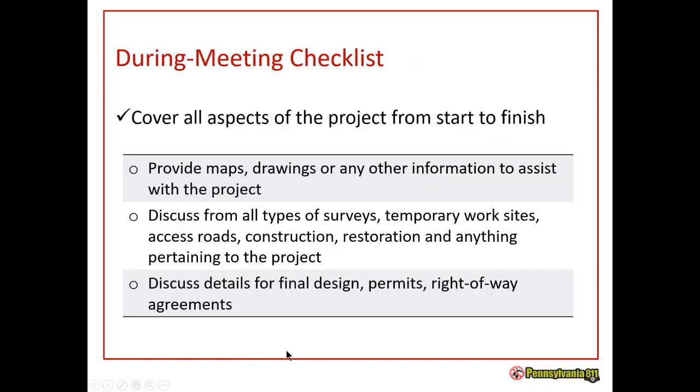So during the meeting, cover all aspects of the project, start to finish, provide maps, drawings, or other information to assist with the project, discuss all types of surveys and permitting, temporary work sites, access roads, construction restoration, anything that pertains to the project, and discuss details for final design permits and right-of-way agreements.